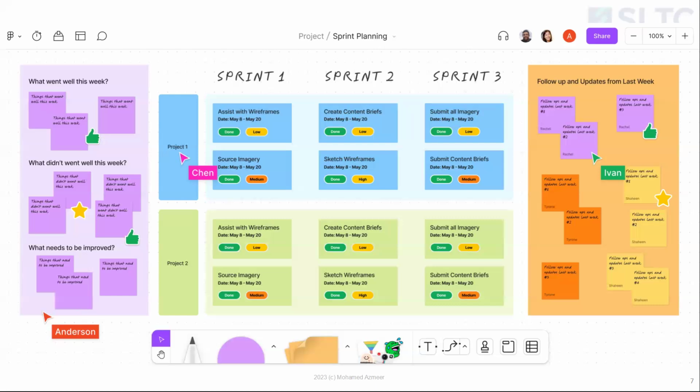So what we do for sprint 1 is from the backlog, let's say you had 100 features. Okay, in our example, we had 4 features, right? So let's say we take the first 2 features into sprint 1, right? And then we assign the 2 features to 2 people, saying, okay, person 1 is doing feature 1, person 2 is doing feature 2. So that's sprint 1. And then we start the sprint.